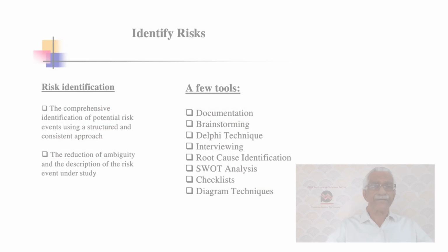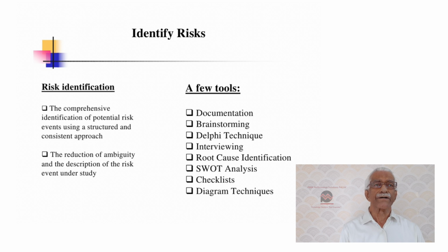Now, what do we do here? I try to identify, sitting together as a group, all the stakeholders, all the possible situations, both positive and negative, that could come up in the project. From where? That's the question. This can be from historical records of previous projects, from various categories like schedule, cost, scope, quality, communications, where there could be areas where you could think of events popping up.